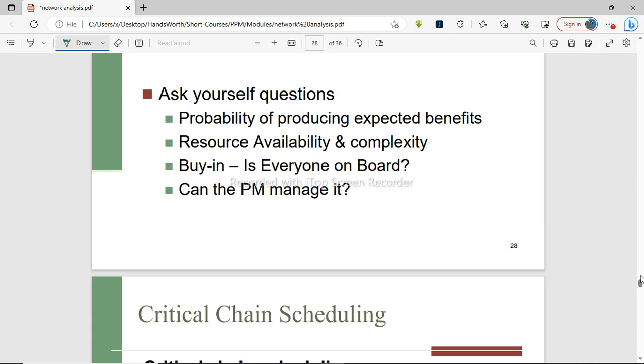All right. Then the third question you have to ask yourself is, is everyone on board with this same decision? Does everyone agree, the experts and also the people involved? Because like the example I gave under construction, you might want to fast track, but the people involved are also scared to say, if we fast track this project, it might result in us ourselves getting into accidents or being injured.